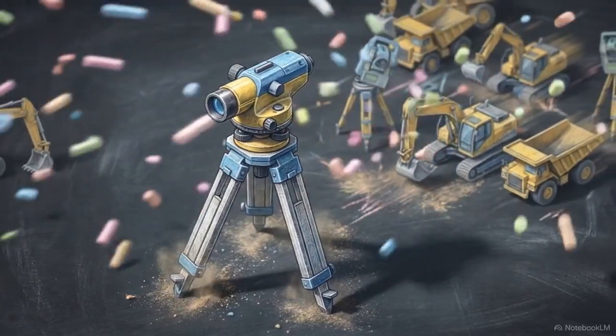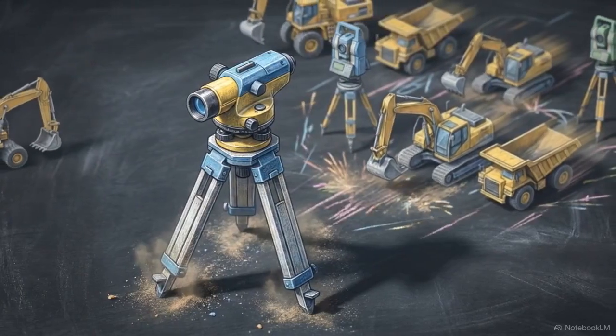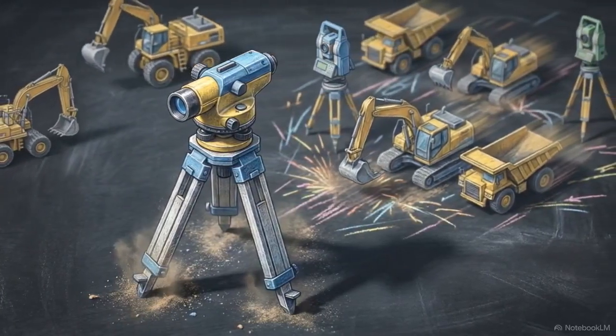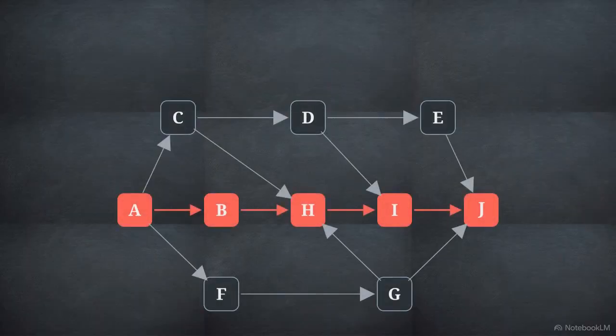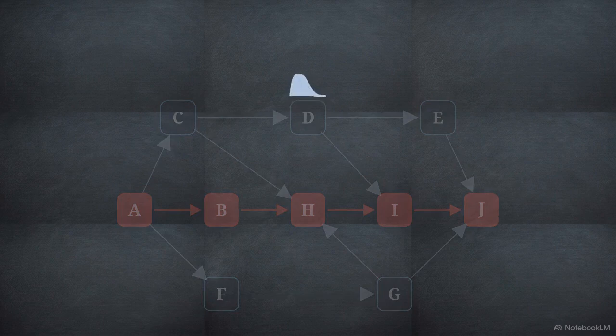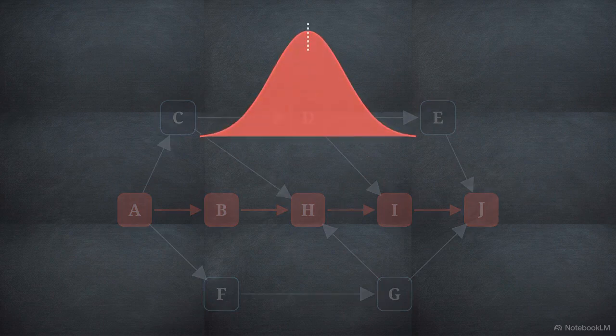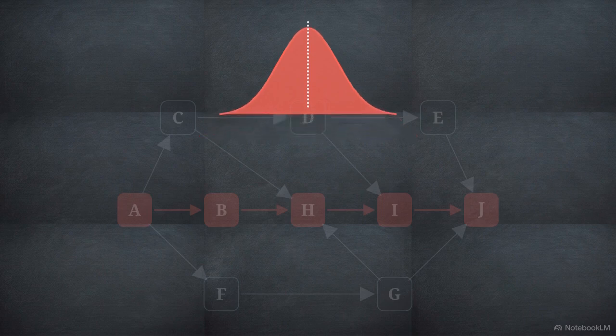Remember that every individual task along this critical path is still ruled by its own skewed beta distribution. To establish the final probability for the entire project, we must sum these critical nodes together. According to the central limit theorem, the sum of many independent random variables approximates a perfect symmetrical normal distribution. To accurately model this bell curve, engineers calculate the project's total variance by summing the variances of only the activities sitting on the critical path.